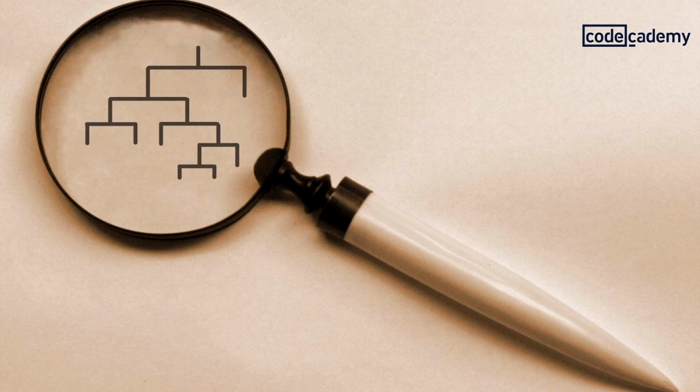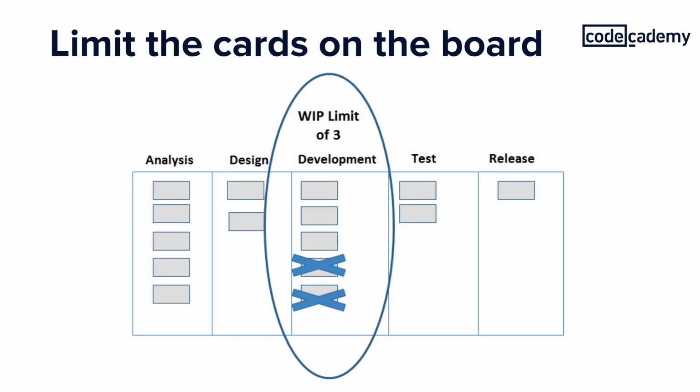We've gone over how Kanban works, and now we'll dive into the specifics of what makes it effective so that teams can get their work done efficiently. Your team will want to limit the work in progress to avoid biting off more than you can chew. Otherwise, you'll spread yourself thin. If you have too many tasks being worked on at a given time, then they'll move along more slowly than if you were to take them on in smaller chunks.